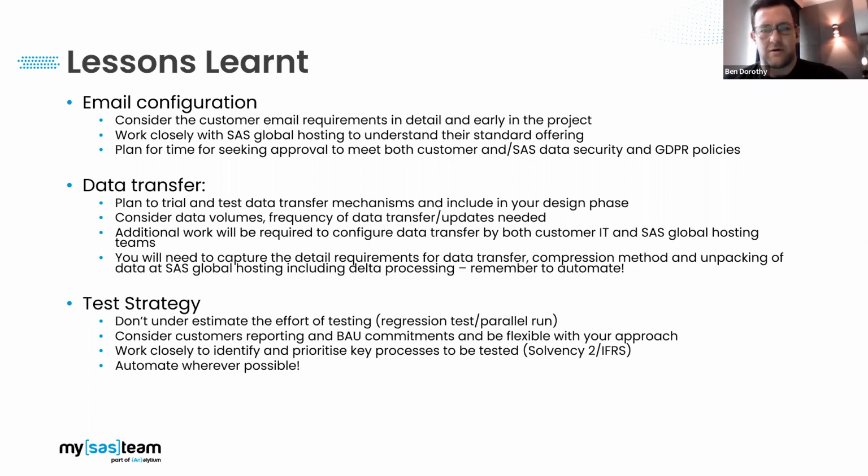With data policies and GDPR, there's often waiver or approval processes that need to be gone through to sanction sharing of data outside of a cloud platform, and ensuring the safe transit of that data into the client environment. So that's the first point I would raise.